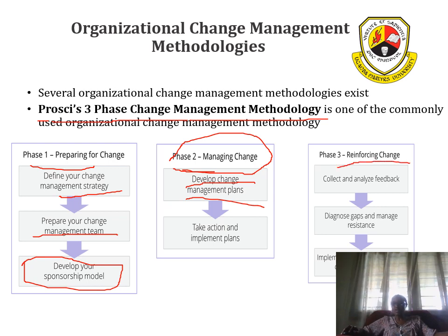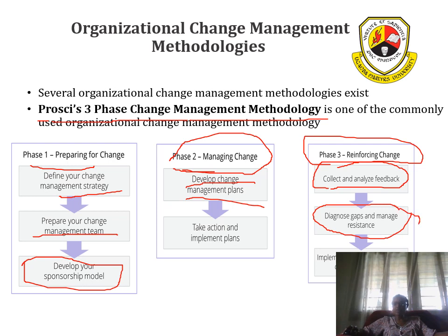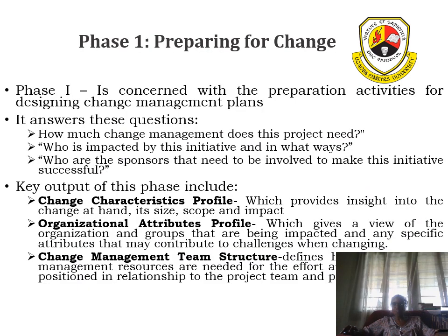Then phase 3, we reinforce our changes. So after implementation, we go back for feedback from those who have been affected and determine how the change has been effected. We diagnose gaps which may have been missed out, and then we implement the new changes. Basically, it's a cycle that we go through. So in the slides that follow, we go into detail of each stage.